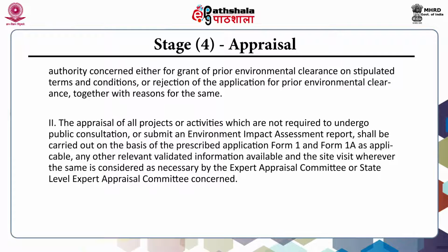Further, the appraisal of all projects or activities which are not required to undergo public consultation or submit an EIA report shall be carried out on the basis of the prescribed application Form 1 and Form 1A as applicable, any other relevant validated information available, and the site visit wherever the same is considered as necessary by the expert appraisal committee or the state level expert appraisal committee concerned.